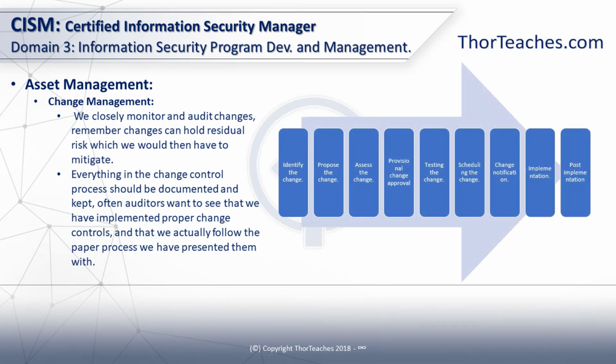And we closely monitor and audit the changes, and there are two terms you should not confuse: change management and change control. Change management is everything, the entire process. And if you're familiar with project management terms, this would be the entire project. Initiation, planning, executing, monitoring, control, and closing, which we already covered. Change control is the parts where we control the change. Makes sense, right? We've done all the pre-assessments, we've done all the planning, now we need to ensure that everything happens according to plan. We control the change.